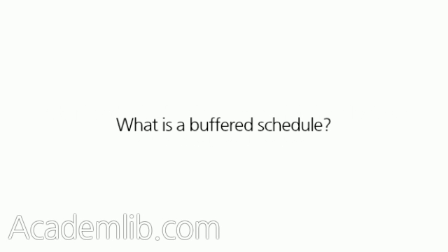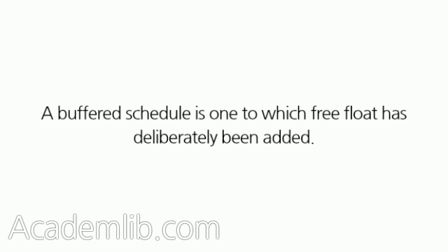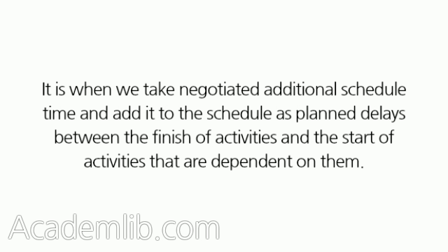What is a buffered schedule? A buffered schedule is one to which free float has deliberately been added. It is when we take negotiated additional schedule time and add it to the schedule as planned delays between the finish of activities and the start of activities that are dependent on them.